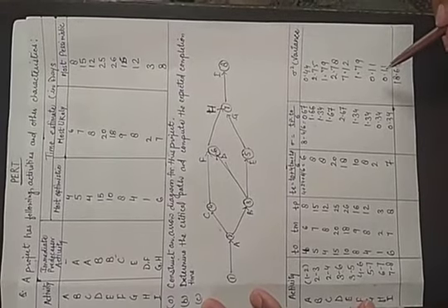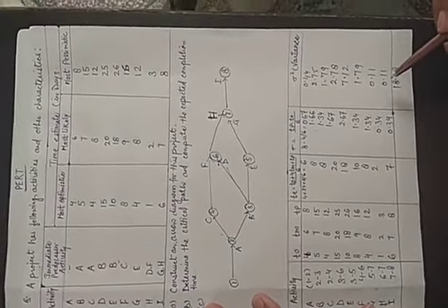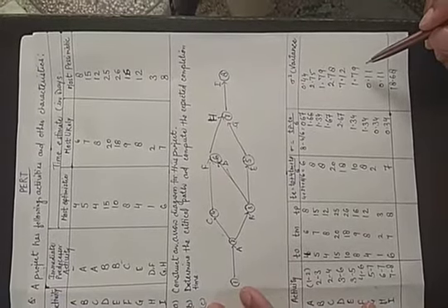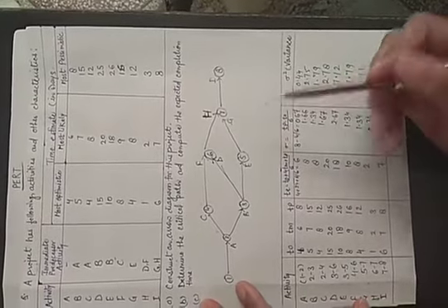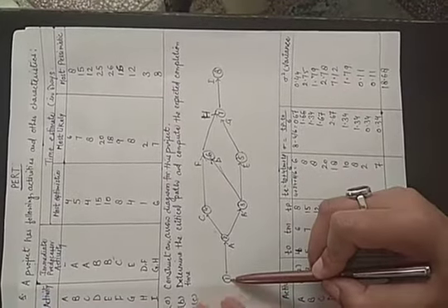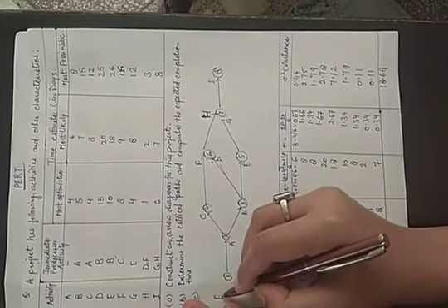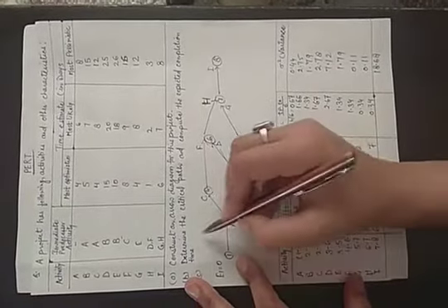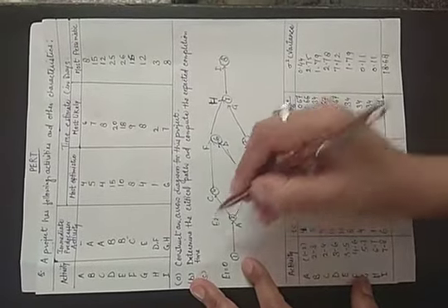And the sum of the variance is equal to 18.68. Now we have to find out the expected start time and latest finish time here. So we will start from E1, the earliest start time. When we will start, the earliest time is equal to 0. Next we have to find out E2. E2 is E1 plus Tij.